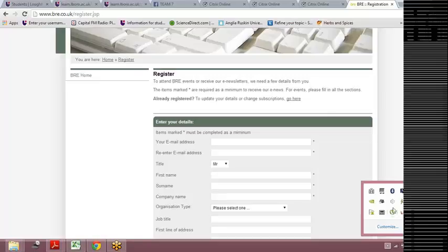So that's what we did. We planned it that way. When the school is off, that's when we worked on connecting, bridging the gap between the two buildings.